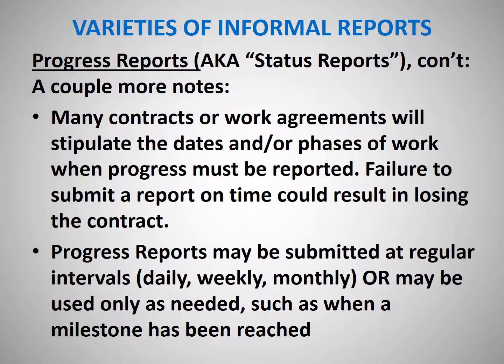Just a couple more things to remember about progress reports. Often, if you are taking on a major job and you sign a contract or have a work agreement, the contract or work agreement will include specific dates or specific phases of the work being done when progress must be reported.